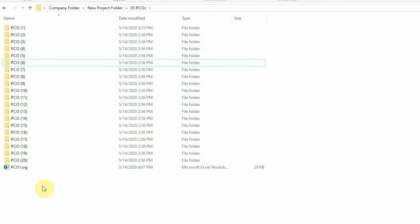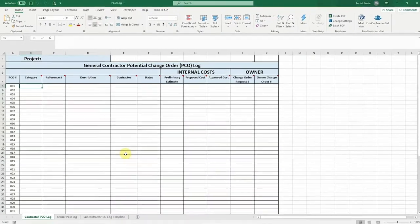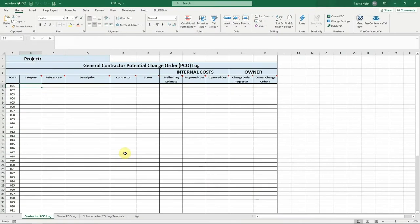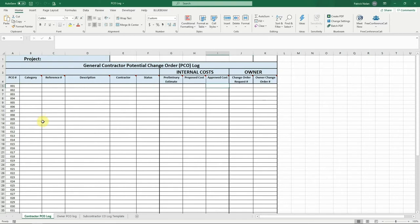The PCO folder also contains a PCO workbook. This workbook will allow you to track every potential change order on your project. The first tab is a contractor PCO log. This log is used to track every PCO that you open on your project. You will enter the information for each PCO that you open and track individual costs related to each PCO, including internal company costs and owner costs. This is the log that you use to work through the small details of every change on your project.